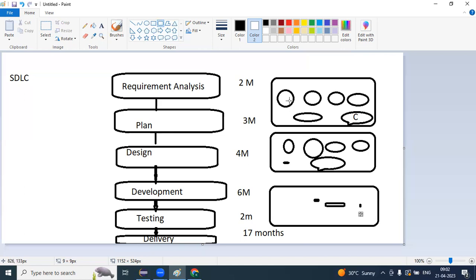And when you are going to develop those features in a 2 weeks sprint or 3 weeks sprint, maximum 3 weeks. Okay, maximum 4 weeks. 3 to 4 weeks, but most people are following a 3 weeks sprint or 2 weeks. If the project is in the maintenance phase, go for the 2 weeks sprint, it is okay. If the project is in the development phase, 3 to 4 weeks, very initial phase. Requirement is in a very initial phase.